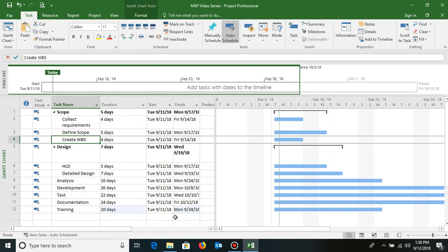When I talk about task relationships, there is one default, basic one, which we commonly use, and that is called a finish to start relationship. Finish to start relationship basically means that once I complete a predecessor, which is the master activity, only then can I start the successor, which is a dependent activity. Let's say, for example, I dig a hole, then only I can plant a tree. I cannot plant a tree without digging a hole. That is pure finish to start relationship.